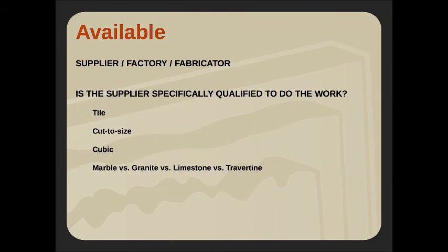Is the supplier specifically qualified to do the work? Another great question. There are fabricators out there who are specifically working on tile. That is their bread and butter, cut and tile. Brazil is a great example where they are predominantly focused on granite slabs, and they don't really want to change their systems to do cut-to-size work. So if I'm going to use a Brazilian granite for a large cut-to-size countertop project, I better make sure that it's available to me out of China so that we can make sure we're getting it.